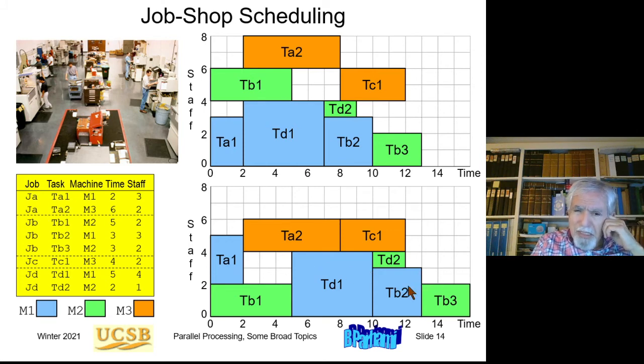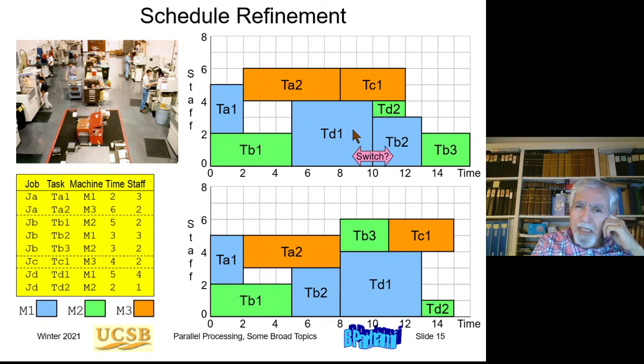So if you take this and then say, okay, I still have some time. Let's see what happens if I switch the order of these two. In other words, bring B2 over here, bring D1 here. Of course, if I bring D1 here, I must change the location of this one as well, which has been moved there. And, well, you see that we maintain the same 6 employees, 6 workers in this revised schedule, but 1 less time units. Instead of 16, it's now only 15.